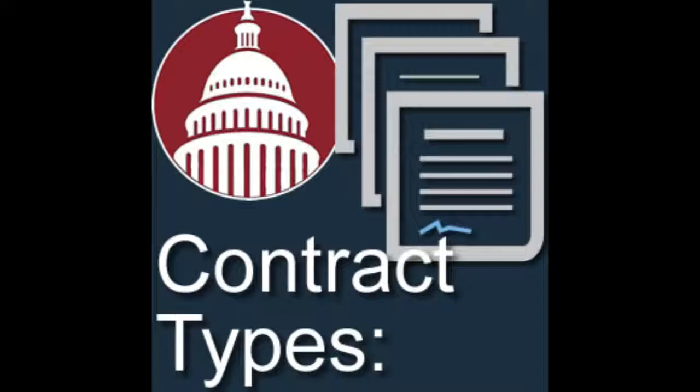So there's fixed price, there's cost reimbursable contract type. Another thing we should mention is you can actually do a hybrid of the two contract types where you propose, say, fixed prices for your time, for the labor involved. I will work for $10 an hour, but actual cost for materials or travel, like you were mentioning before. So an example of this, I hired someone to paint my house, and they estimated it was going to take a certain amount of hours to paint the house, and we fixed that. So regardless of the hours, the price for painting was going to be, let's say, $500.